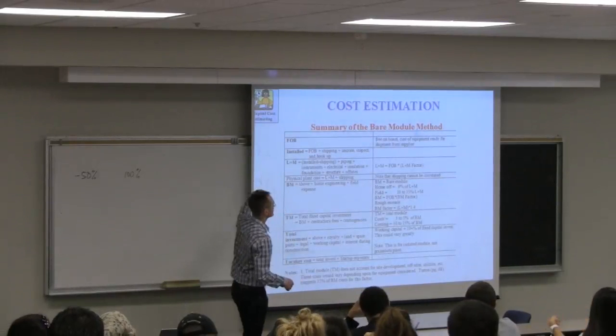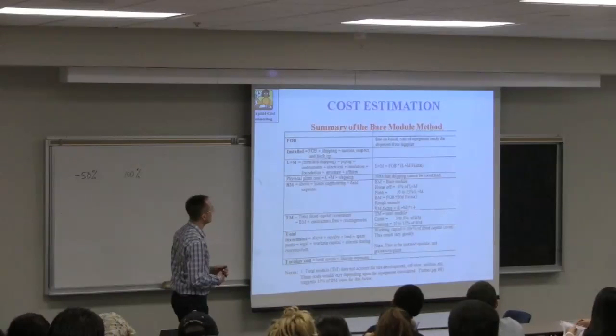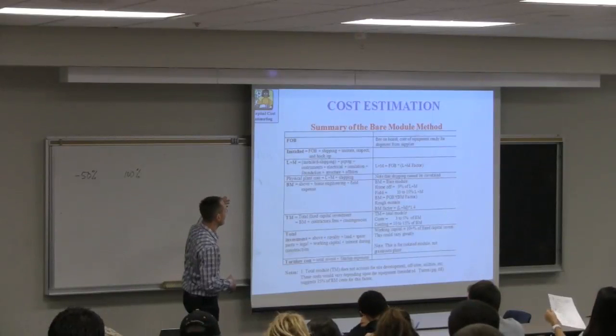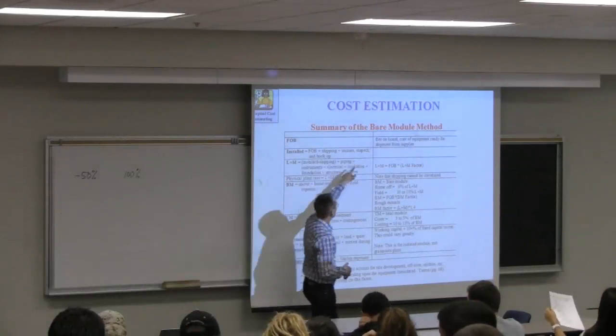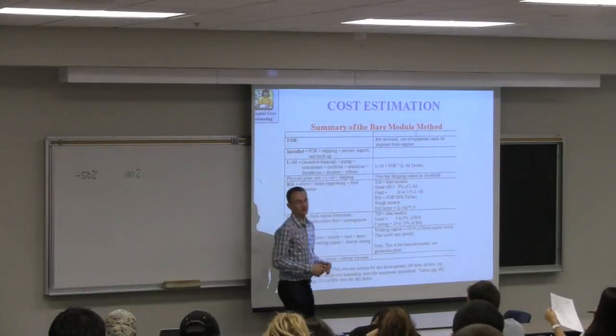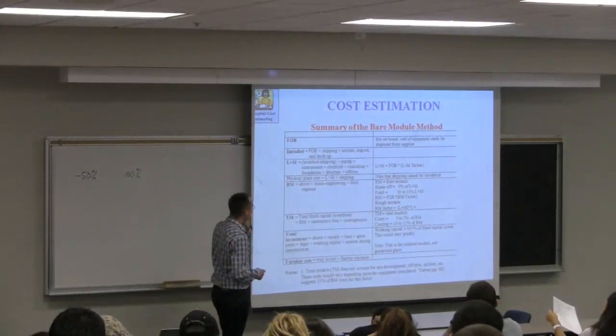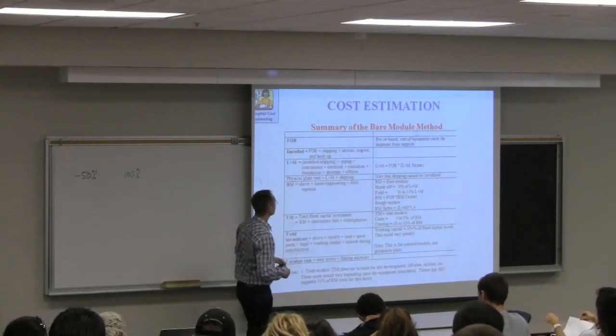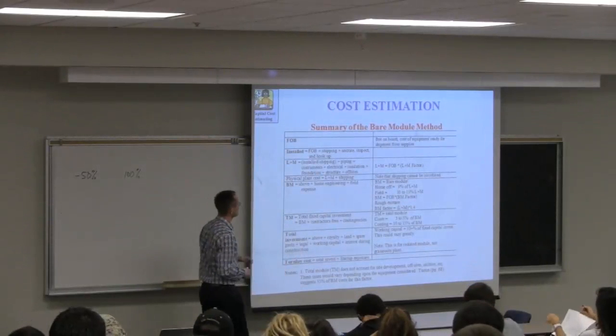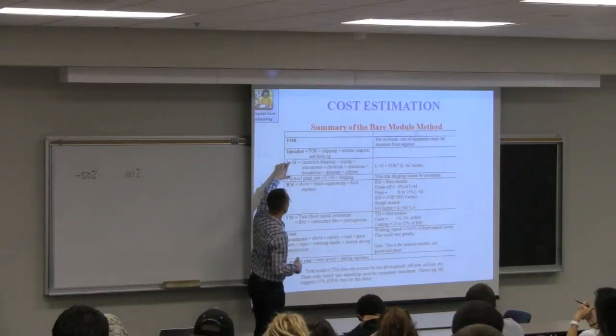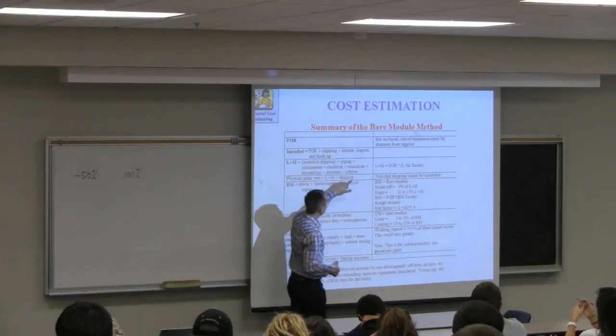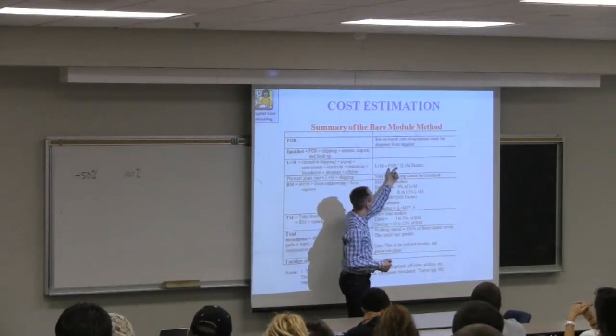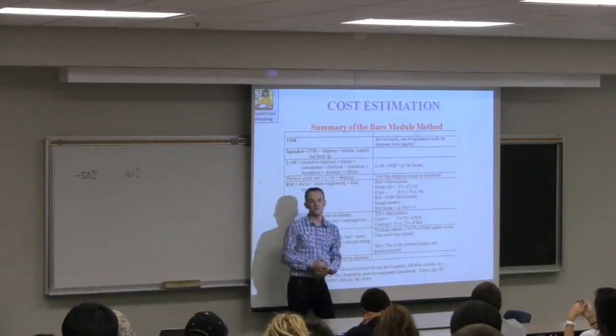Here's what we're going to do. We've got our FOB price. This is the quotation from our supplier. Our supplier is saying you can pick up this equipment from our loading docks at my location and that's the price you're going to pay for it. Then we're going to add in shipping and crating and inspection. If we look at that, that's the installed cost. Then there's labor and materials cost. This is an additional factor.